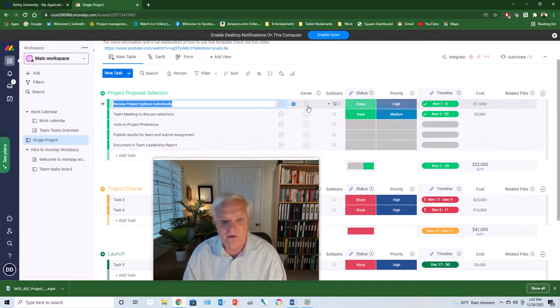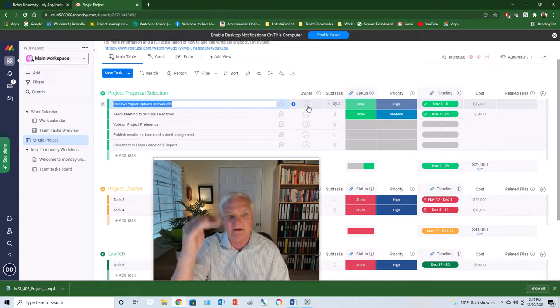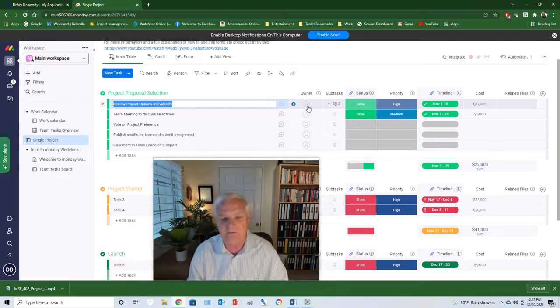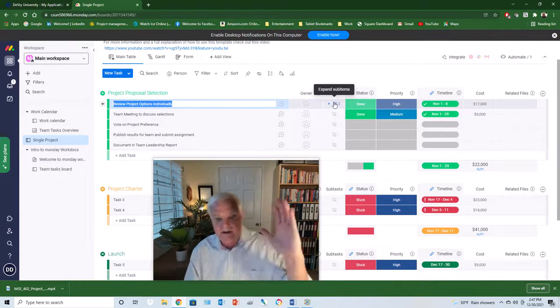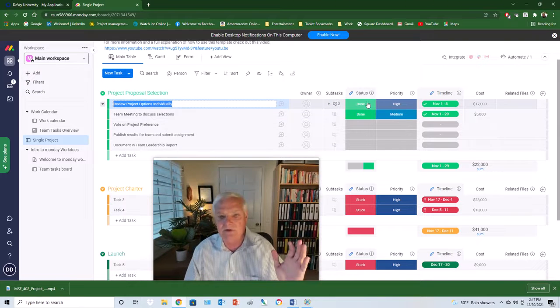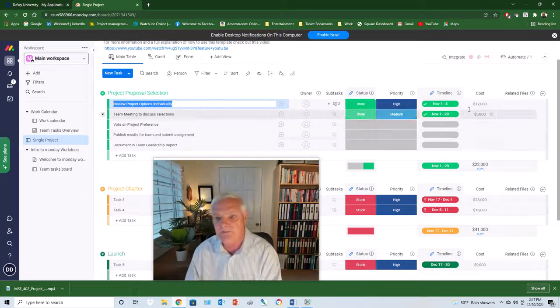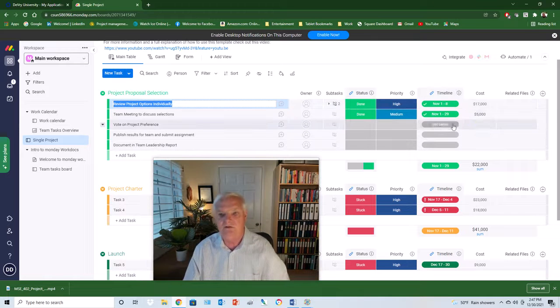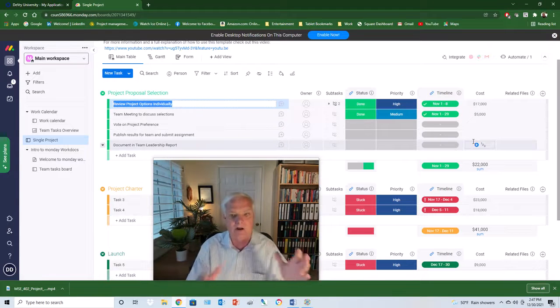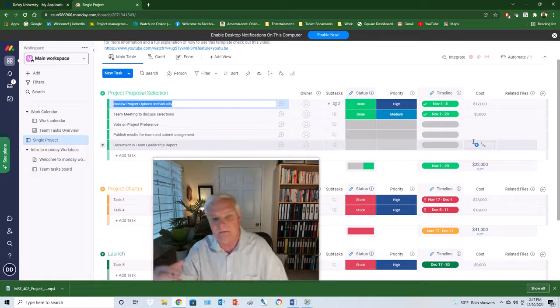I would also, similar to what you did in 608B, lay out an owner for each one of these assignments. Each assignment should be the project management team leader who owns it. Okay? You can see how you can lay out subtasks. To expand those, you've got the ability to create status as you're moving through your project. You've got the timeline, so it gives you chances to go ahead and put the cost and schedule information for you on each one of these elements.